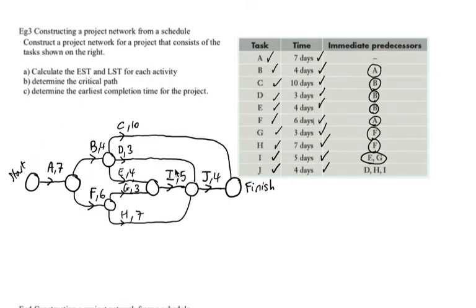We do that by doing a forward scan. So we start at the start, I'm going to do that in blue. 0, 7, 11, 13. Do you see how that circle there was very small? So what I can do is clean that up. And I have to figure out what that was. I think it was H. So you can see here, I'd probably have drawn my circles a bit too small, just because I was being crammed up. Okay, this one here is 11 plus 4 is 15, and this is 16. Therefore, we choose 16, the maximum value.